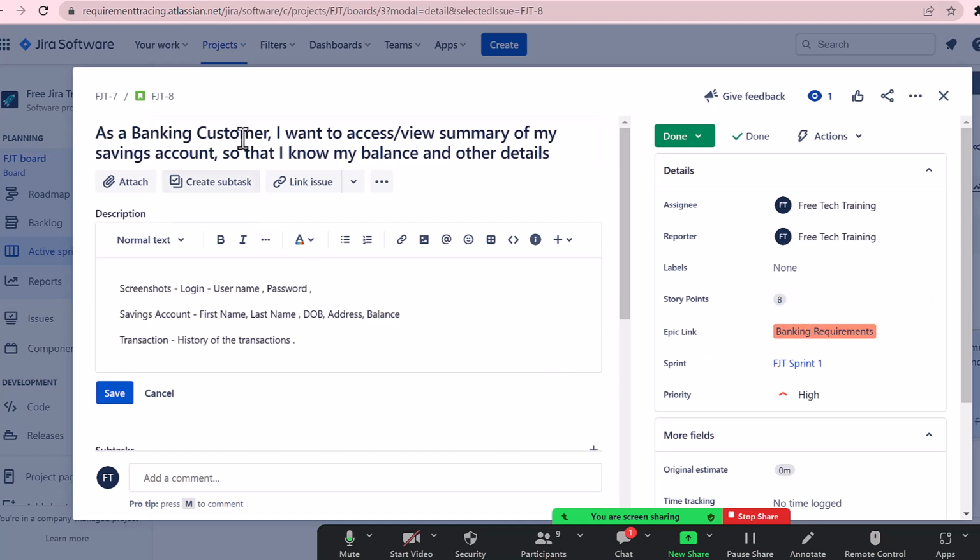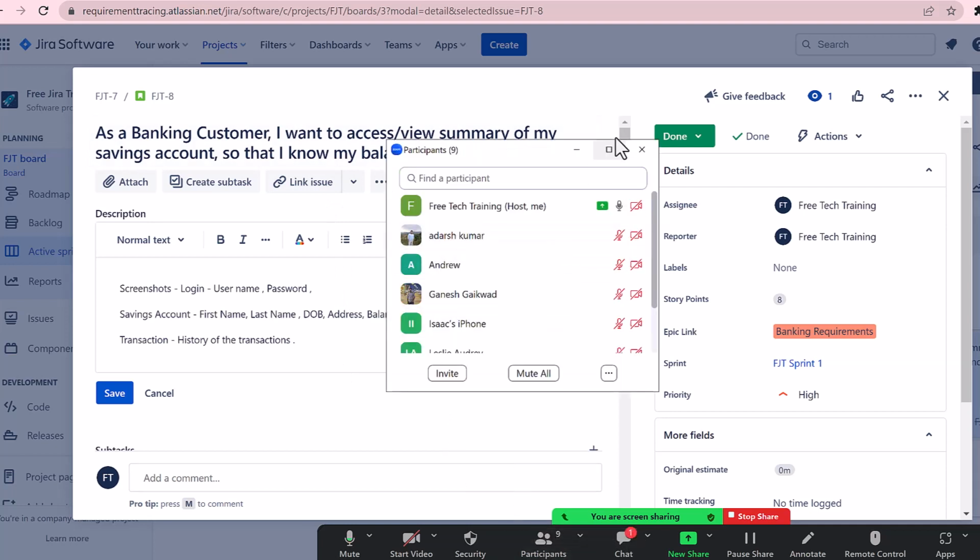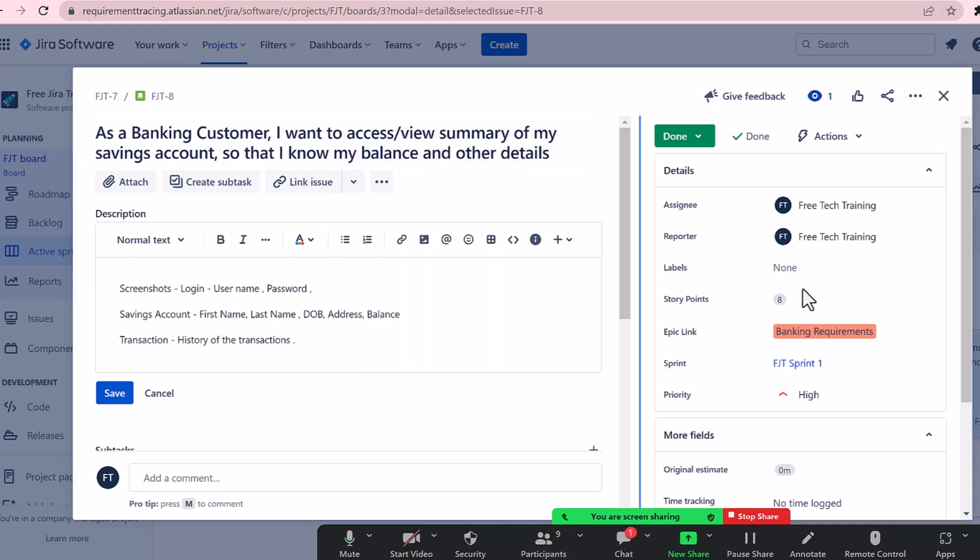And the requirement, if it is a very big huge requirement, then we have to break it down into part 1, part 2, or part 3, like that. You have to break down this requirement and make sure that every requirement is around 8 pointers. We don't want to have 13 pointers or more for a requirement. It's going to be a very complex requirement, and it's going to be very difficult for a developer to develop that requirement. So what we have to do is discuss with your technical team and break down one story into multiple stories.